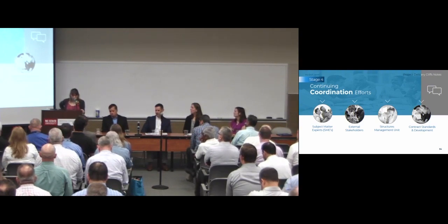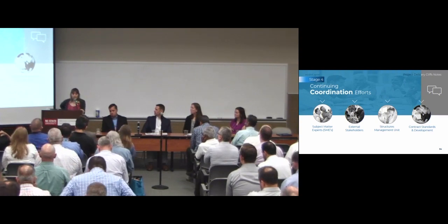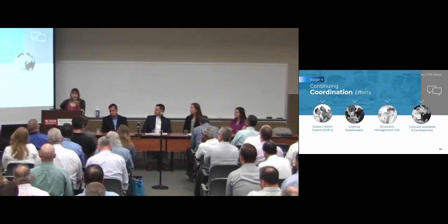We also have the structures management unit. At PS&E turn-in time, structures reviews any structural related plans while the contract standards is reviewing the rest of the plan set. So it's important to be coordinating with them as well, making sure that they understand what's in the rest of the plans and that there's no conflicts.